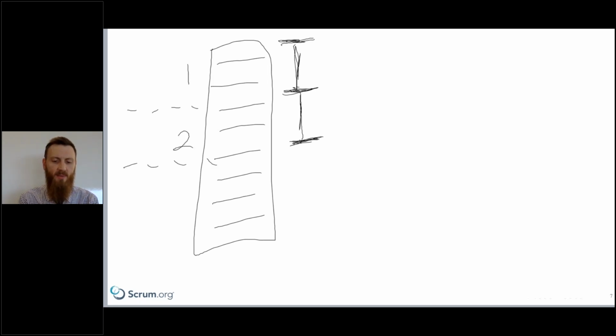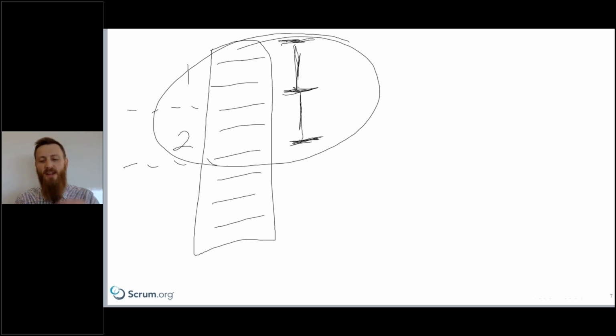So you can see we got 2 items done. We normally get around 2 items. So we're doing a little forecasting here in our backlog. And these on the right side here, I'm just indicating that I'm looking forward down my backlog about 1-2 sprints. Now, again, not a hard rule, but if you do that and you try to get the top of your product backlog in good shape, and good shape means you have some clarity on what it looks like when it's done. You have some acceptance criteria clarity.